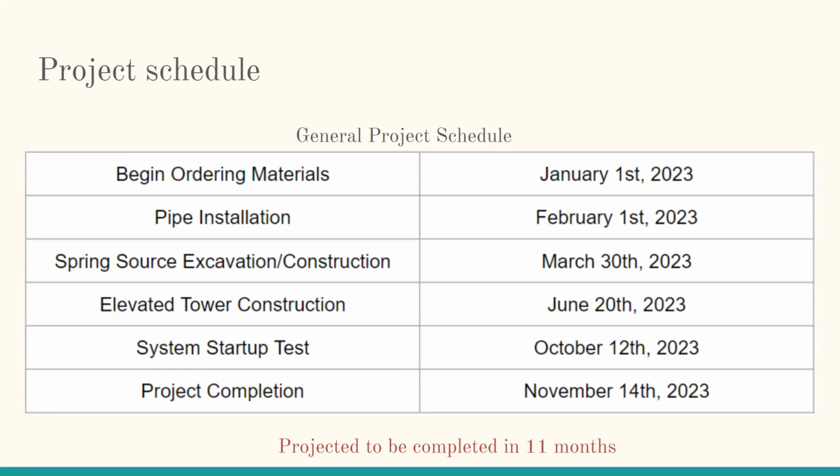Our estimated project schedule is to be completed in about 11 months. While this design is simplistic, our assumption is that community labor will be provided on a volunteer basis, but that is never guaranteed. We assumed that we would have a crew of about 4 individuals working at any given time, but that can be unskilled labor that extends the period of time for pieces of construction to occur.